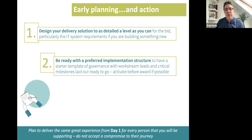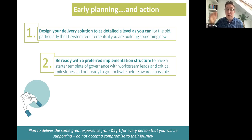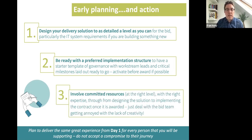Be ready with your implementation structure: how are you going to run it? What governance have you got? Get a template ready, get your work stream leads identified, and get a critical set of milestones laid out and running before award is issued so you've already got a rhythm going. We've seen this work really well with a couple of organizations where development work on IT happened early at risk — they focused on areas that would benefit the wider organization first, and then the rhythm was there. Once awarded, they just kept going.